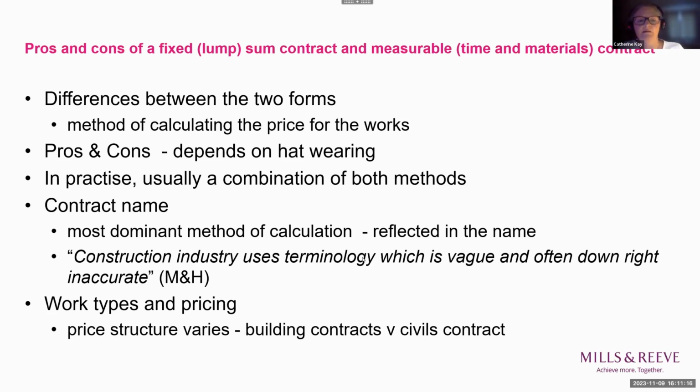So I'm just going to look a little bit more in detail at reimbursement contracts. Here the client takes the risk of the final price being different from the estimate. It keeps the savings but pays for increases. This is on a works paid basis of the actual cost. But in these circumstances, there aren't any guarantees that the estimated price will remain the same. Prices, as you all know, go up and go down.